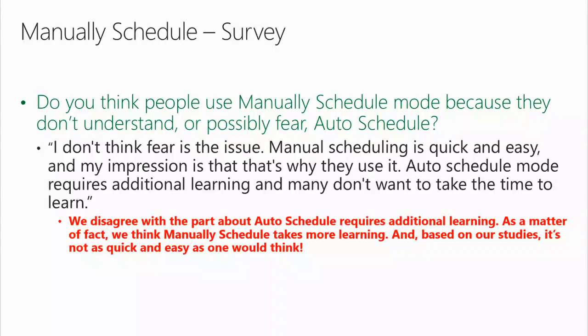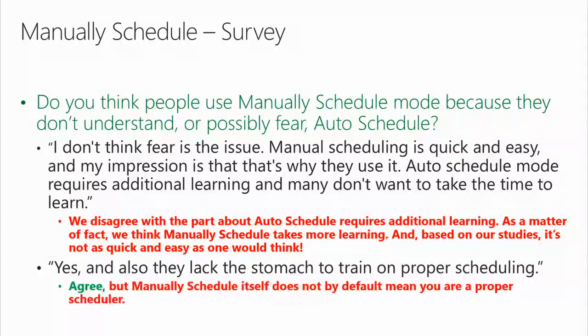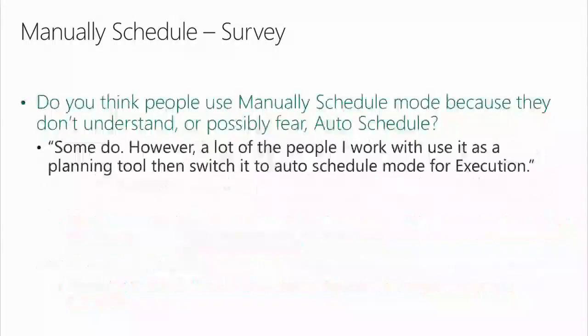At its heart and soul in auto-schedule mode, your job is to assign a resource, a units value, and a work value. Project calculates duration and drives the schedule. At the highest level, that's what you need to know. That's quick and easy. "Yes, and also they lack the stomach to train on proper scheduling." Agree, but manually scheduled itself does not by default mean you're a proper scheduler. And then somebody said some do.